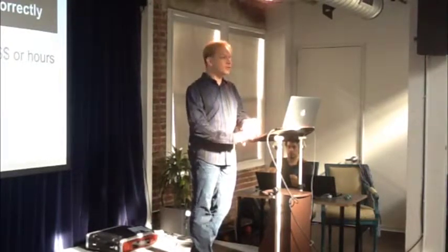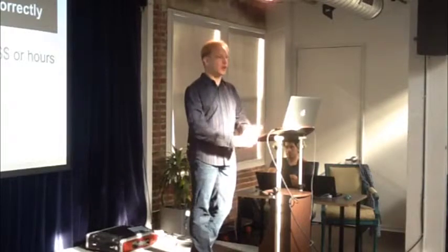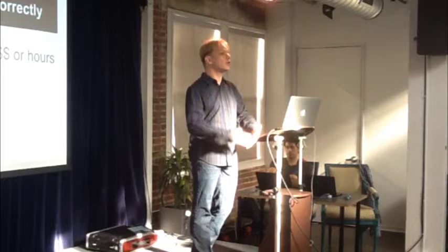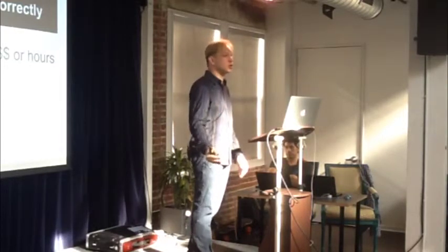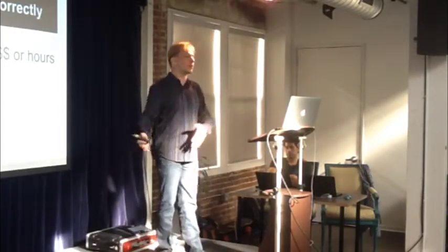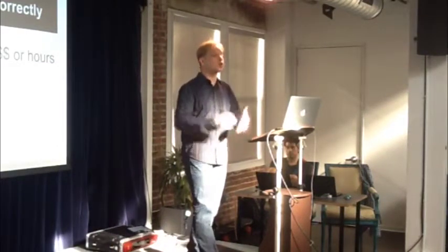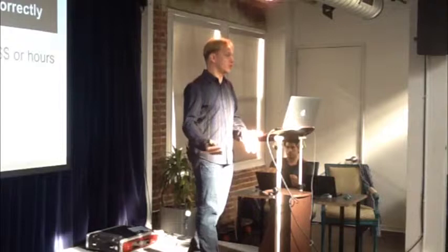Those reviews, if they have changes or revisions, those need to get implemented. It needs to be retested, passed through QA again, deployed again, finally approved, and then deployed into production. By the time all that has happened, the 15 minutes of coding is a very small slice of that feature, and it could very well be a $650 task.